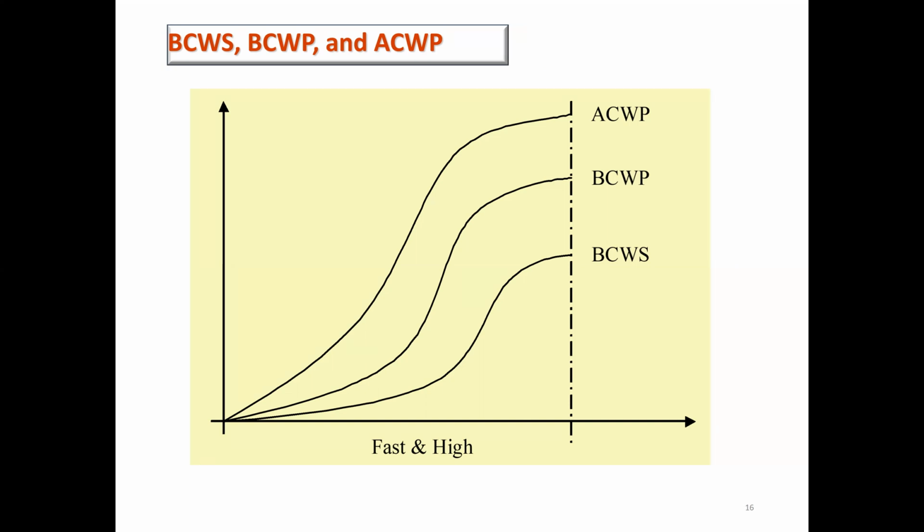So if the cost is positive, it means under budget, and then cost is low and we will be making profit. If cost is negative, so it will be high, then we will be over budget. We will be spending more and getting less. Okay. So for this